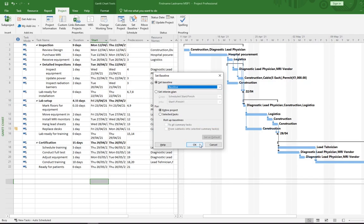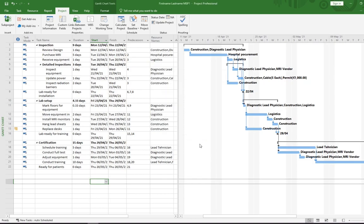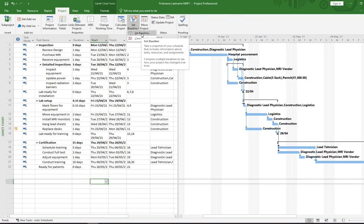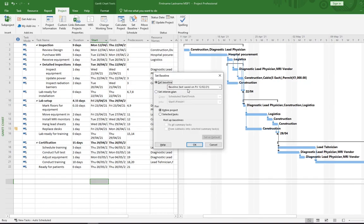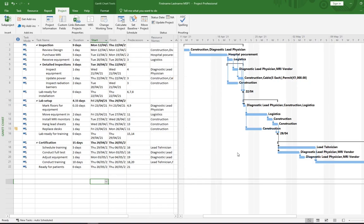Click OK. You might not think anything has happened, so to verify it worked, go back to Project > Schedule > Set Baseline. Now you can see the baseline gives us the date it was saved — Friday the 12th of February, which is today's date. That confirms when we set the baseline. Click Cancel; everything is okay.